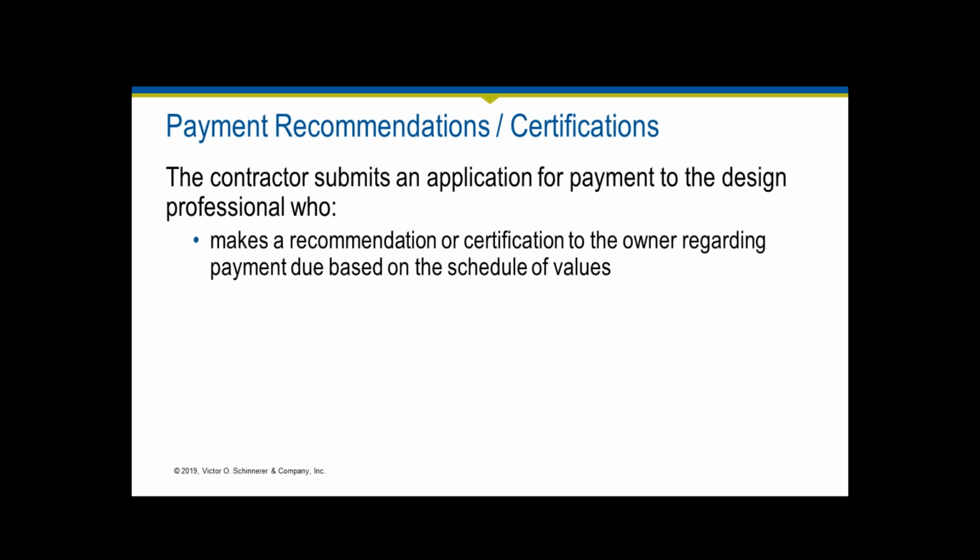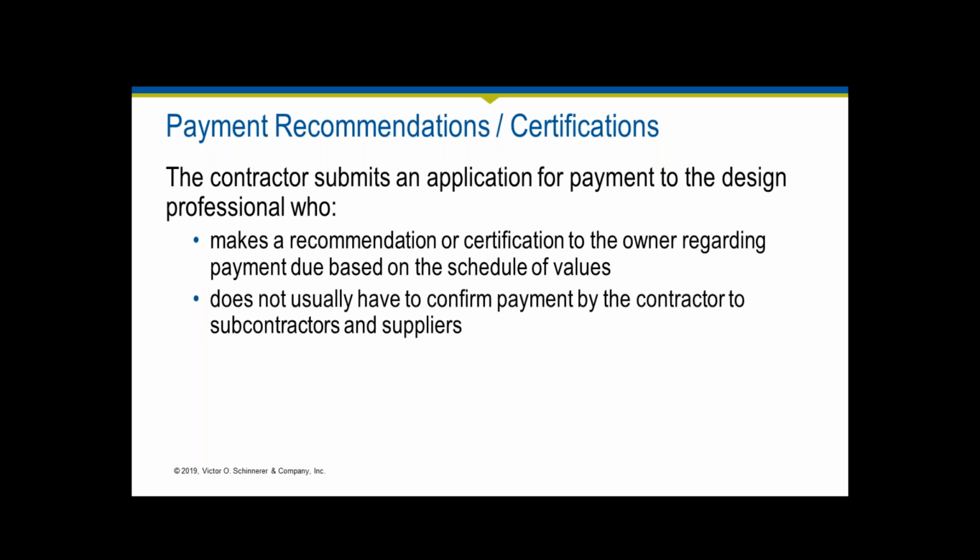So you're making a recommendation or a certification to the owner. And the other thing that you need to realize is that this does not mean that the contractor has paid their subs. If there are issues or concerns about that, there may be a payment bond that the contractor is certified that they will pay their subs. But generally, as a design professional, as a design firm, it's not on you to confirm that they have made payment to their subs and suppliers, and you don't want to get sucked into those types of issues.